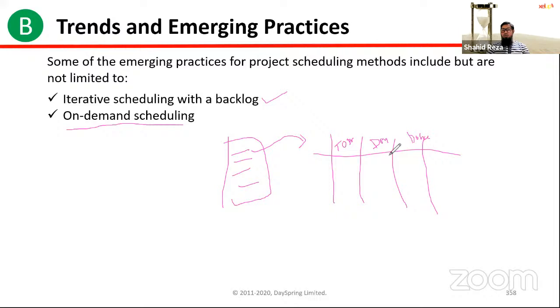And for each column, we can put the WIP. WIP means work in progress limit. Work in progress limit, we can set. So say in our to-do list, we have 10 items to do. In doing, in brackets, we say our work in progress limit will be 3.